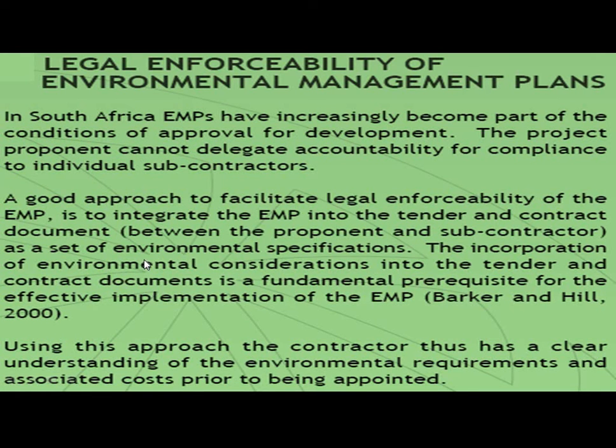Legal enforceability of the environmental management plan. What is legal enforceability? In South Africa, EMP has increasingly become part of the conditions of approval for the development. This is not in India, so India is not forced. I'm just talking about some of the countries. The project proponent cannot delegate accountability for compliance to individual subcontractors. So you cannot say that the contractors did not do it. The project proponent has to do it.